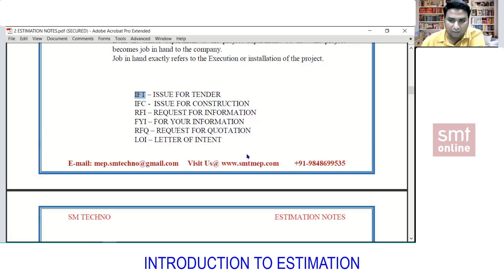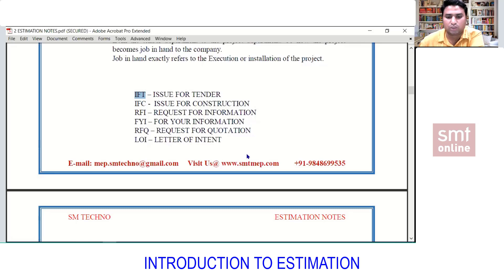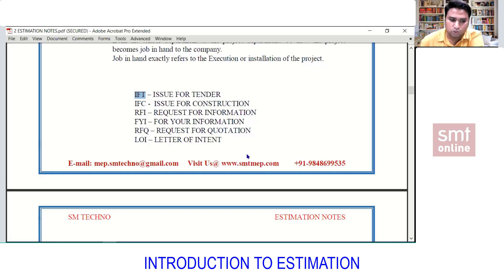Letter of Intent: the word 'intent' refers to intention. For example, if we have quoted the least price among all participants in the tender stage, they call us for a meeting and say they want to award us the project. However, there will be some negotiation. A technique used is that no one gives the rock-bottom price at the tender stage — we keep the price five to fifteen percent above the selling cost, because the client will try to bargain.